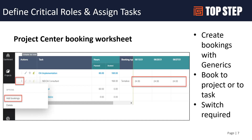For example, if you book 40 hours over a three-week period, once you hit save it will show it in the booking worksheet as one third of the 40 hours in each week between the start and end date. From there, just like within a worksheet in the resource module, you can continually modify the bookings each week by editing them in the grid. It's a really nice way to create bookings from the project without leaving the project module, while also seeing those bookings compared to your project plan — especially useful if you are booking to a task.